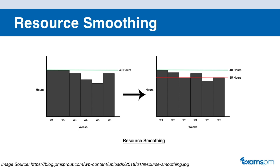Since you can't extend the schedule, the project completion date and the critical path will stay the same. The activities cannot be delayed more than their total or their free float.